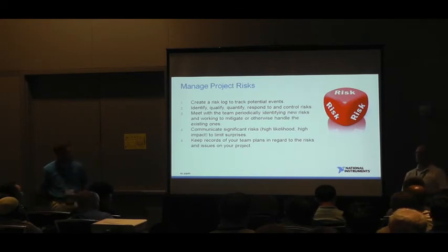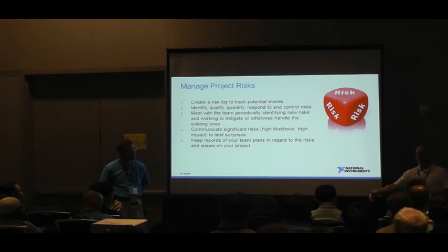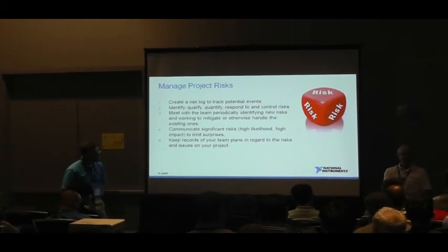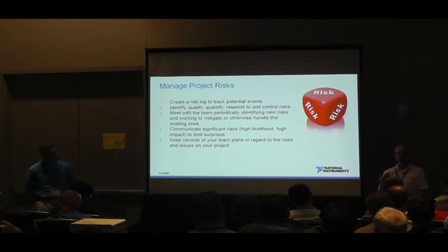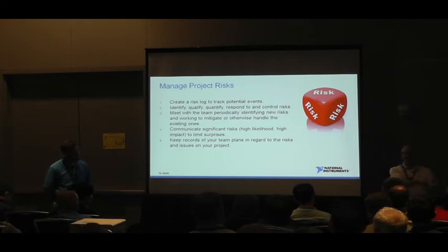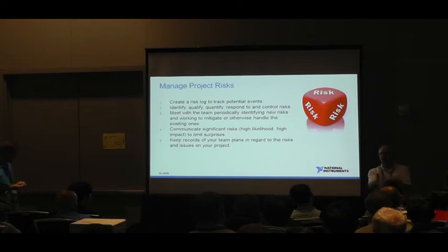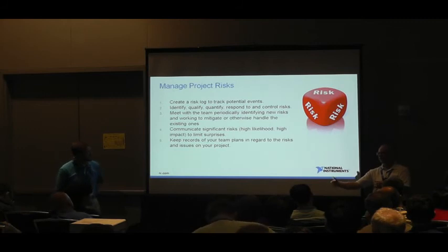One other comment about the WBS. I think on a lot of projects we get toward the end, we know it's due this Friday, and it might have started last weekend where you burn the midnight oil and everybody's in a frenzy. We've got to work like crazy to get this project done by this Friday. If you can take that focus, that energy, that passion, and apply it at the interim milestones throughout the project to make sure that the conceptual design, the detail design, the software development all happen on time, then your chances of hitting that end date are much improved.